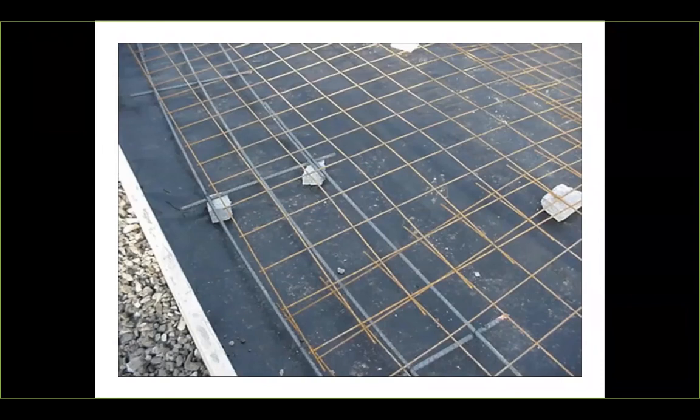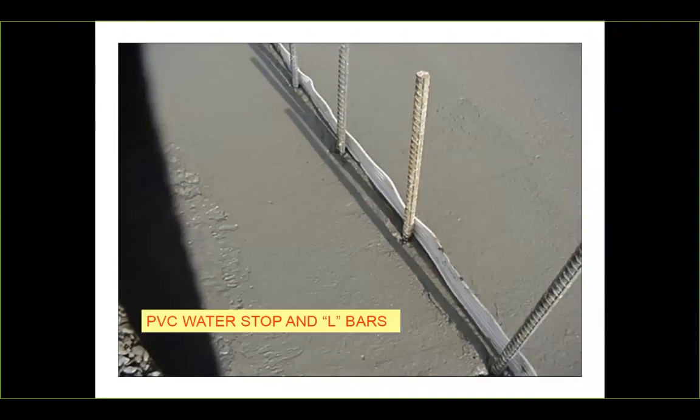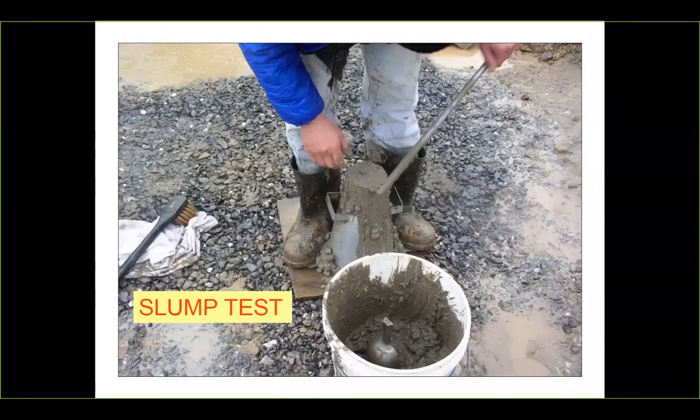Verify that the rebar or your welded wire mesh is propped up by the appropriate material. No clay bricks. You want either concrete or metal chairs and the like. You want the appropriate cover between the rebar and your form. You want to verify all of that. Before the concrete is placed, you want to make sure that the water stop was installed where they said they were going to install it, and that the proper water stop is in place. So you want to pay attention to the construction sequence and inspection sequence. If we are responsible, as a part of our quality assurance objectives, for verifying concrete in the field, make sure you have the appropriate equipment to do your slump test or whatever test the designs called for.